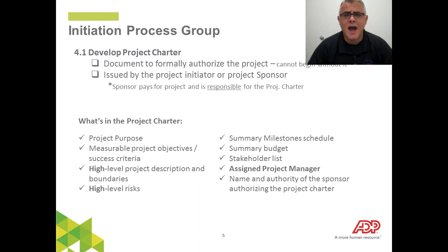Project charters are usually high level, not very detailed, because you want it to be detailed enough that it outlines the purpose, the authorization, and the general intent of the project, so it stays valid throughout the course of your project. Because as you're working on your project, you're going to progressively elaborate on the key details or specifics, such as how many resources are needed and how much money is actually going to be spent and allocated in different areas. You'll be developing the scope and building the requirements out at a later point in time. So you don't want to throw in specifics on your project charter. You want it to be high level enough so it stays valid through the course of your project.